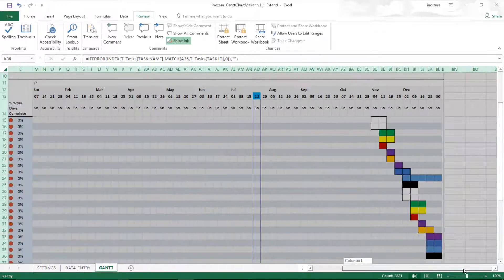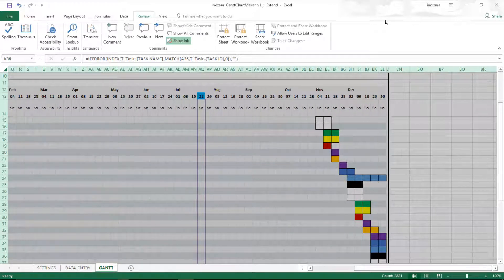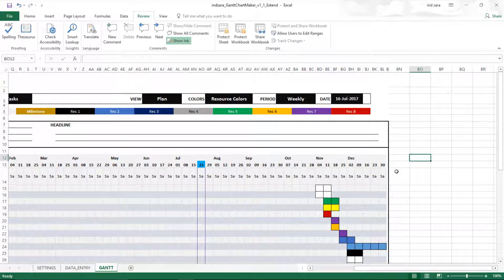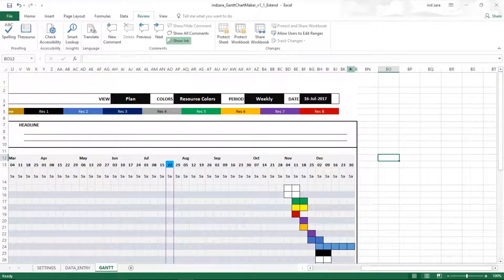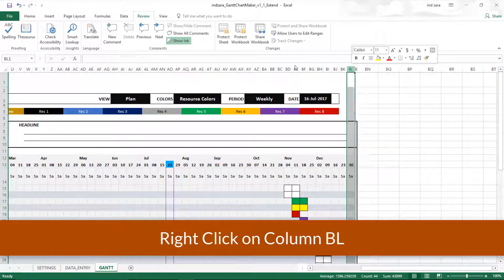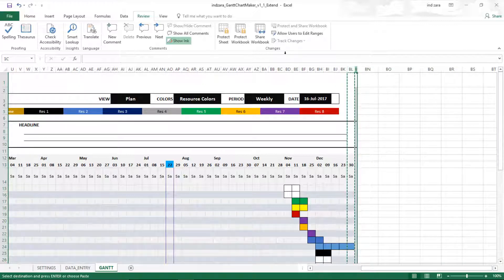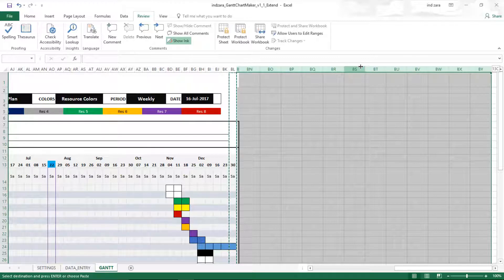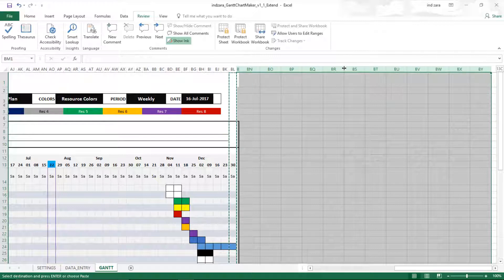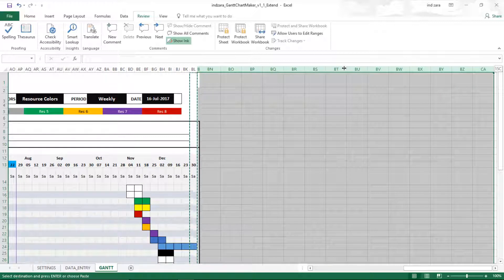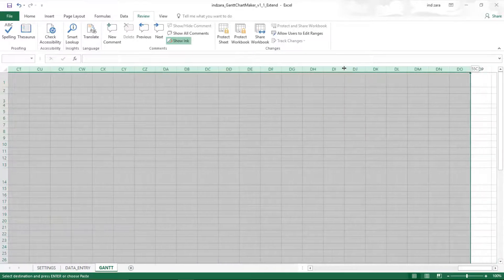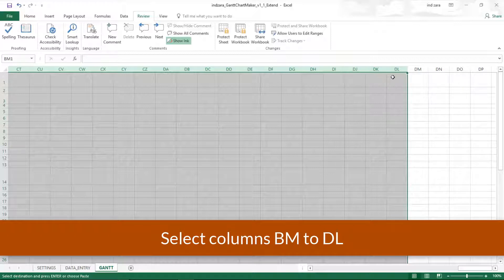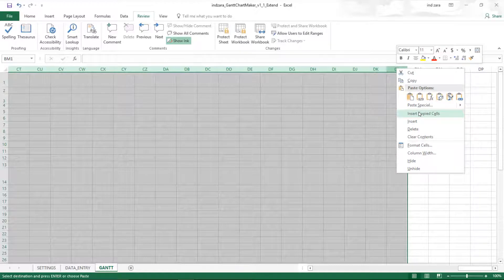This now means that you can actually view all the columns in this sheet. The reason why we did that was in order to include more columns, we need to make sure that they are first visible. Next step: right-click, copy. Now we're going to select columns from BM, which is the next one, and keep selecting the columns. You can see a little text that shows how many columns you have selected. I'm going to select 52 more columns. Now I'm going to right-click, insert copied cells.